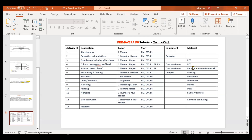Let us first add the materials, which is the easiest part. The materials we need to add are: PCC, RCC, rebar, aluminum formwork, flooring, blockwork, woodwork, plaster, paint, sanitary fixtures, and electrical conduiting. I'll show you by adding only two examples — the rest you can add yourself. We need to decide units of measurement: PCC and RCC will be cubic meter, rebar will be metric ton, aluminum formwork and flooring will be square meter, blockwork cubic meter, woodwork lump sum, plaster and paint square meter, and MEP items lump sum. So we need only four units: square meter, cubic meter, metric ton, and lump sum.